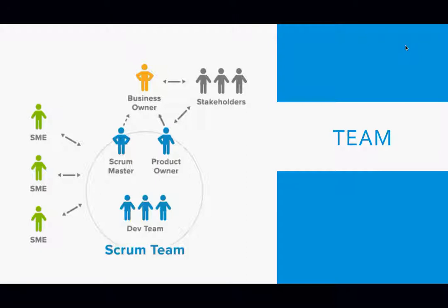What they do is you bring a poker, like a card, basically. So everyone will get that card. It's got 1, 3, and the Fibonacci series. Everyone has a pack of those cards. So after deliberation of that particular story, they will ask everyone to bring their card out, so you bring it at the same time.